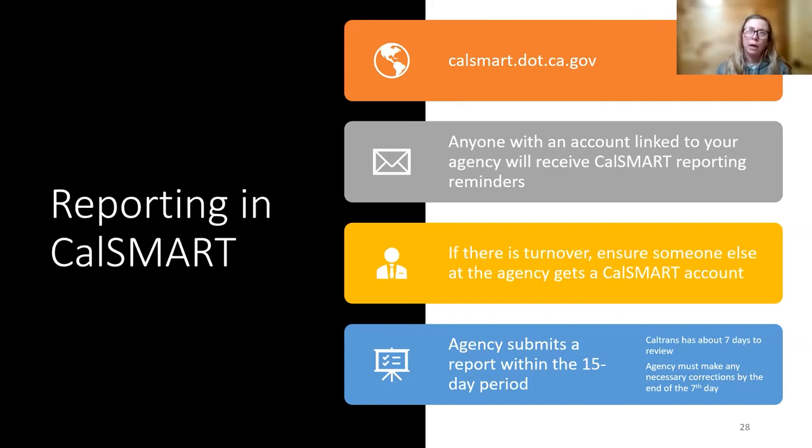And I do want to just say there is some confusion sometimes because you submit your completion report, but you can't submit your final report until all of the activities, including invoicing and the after counts, are done. And that could take sometimes up to a year after you submit your completion report, because you have to do your counts the same time of the year, consistent with your before counts.